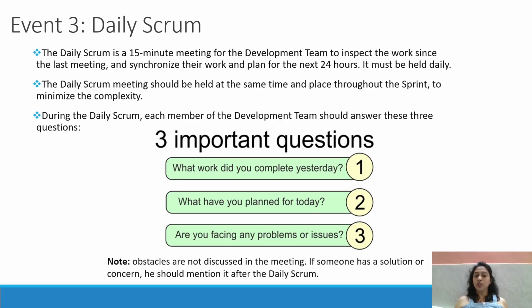What work did you complete yesterday? Second question, what have you planned for today? And are you facing any problems or issues? These three questions will be discussed in this 15 minute meeting. Note that obstacles are not discussed in the meeting. If someone has a solution or a concern, they should mention it after the daily scrum. For the third question, are you facing any problems or issues, just raise your hand and state exactly what problem you are facing.